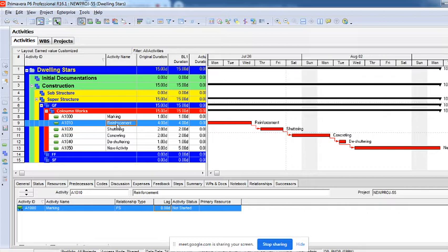But there are non-critical activities, meaning activities which have extra days of duration, and that extra duration is not affecting the total duration of the project. So what happens when we have something extra all the time? We tend to use it. That's the tendency, because we feel we have extra days here, we can relax, we can remove the resources here. Yes, of course, that is given for that purpose, but we should not forget that extra days are also limited. We cannot use them forever. So if you want to give that limitation, you will have to use constraints.